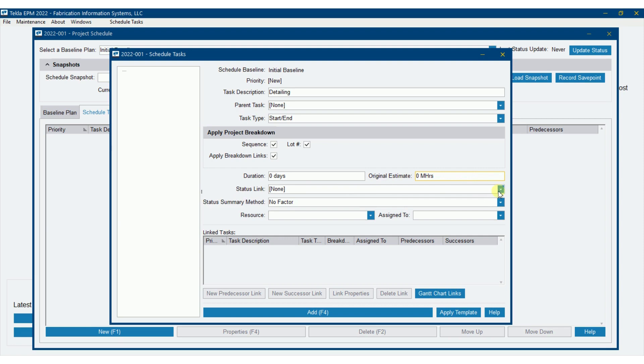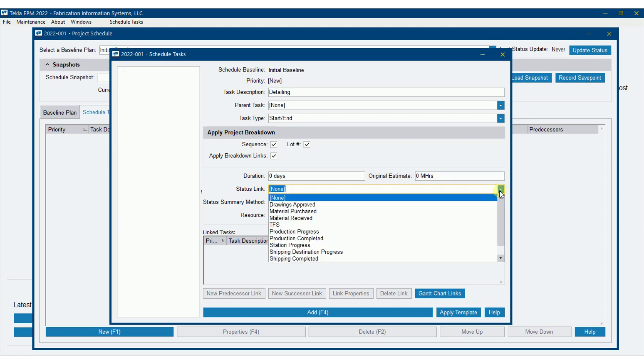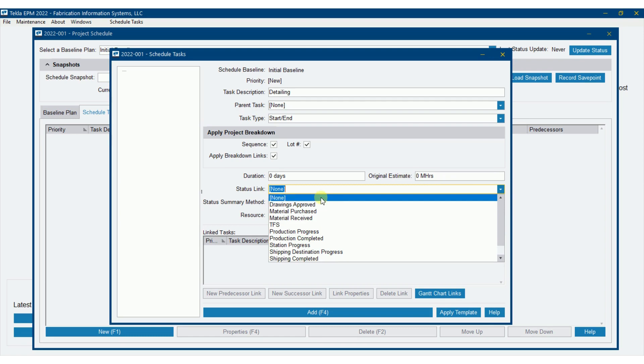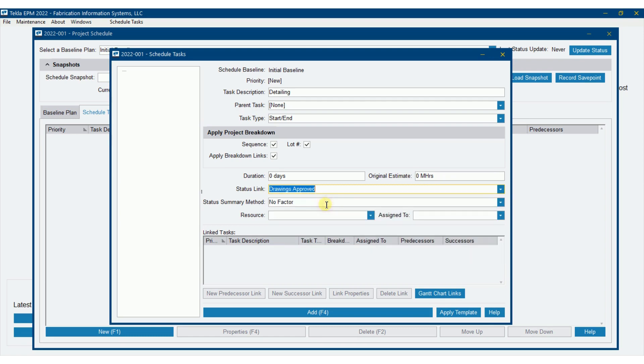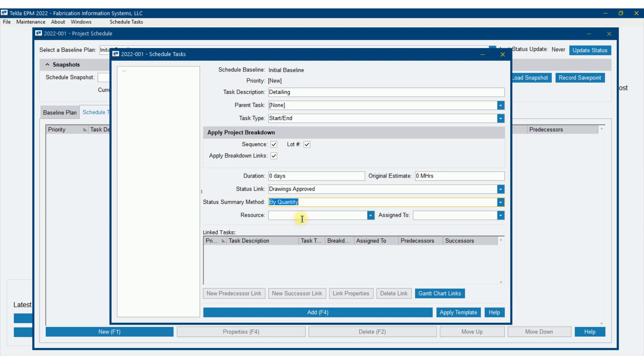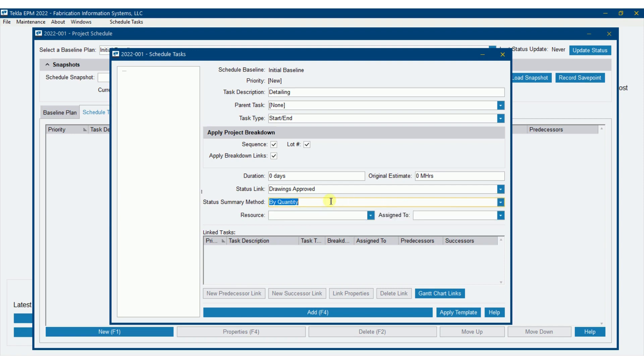So now status link. This is how you want the schedule to tell you when this particular task is completed or what percent completed is. So in other words, here it would make sense for detailing for me to say, let's show percent complete of drawings approved. Now I don't have to do anything here, but I'm going to go ahead and do this. I'm going to go ahead and do drawings approved. And status summary method is how do I want it to calculate that? I'm going to do this one by quantity rather than by weight or duration. We'll do it by quantity here.